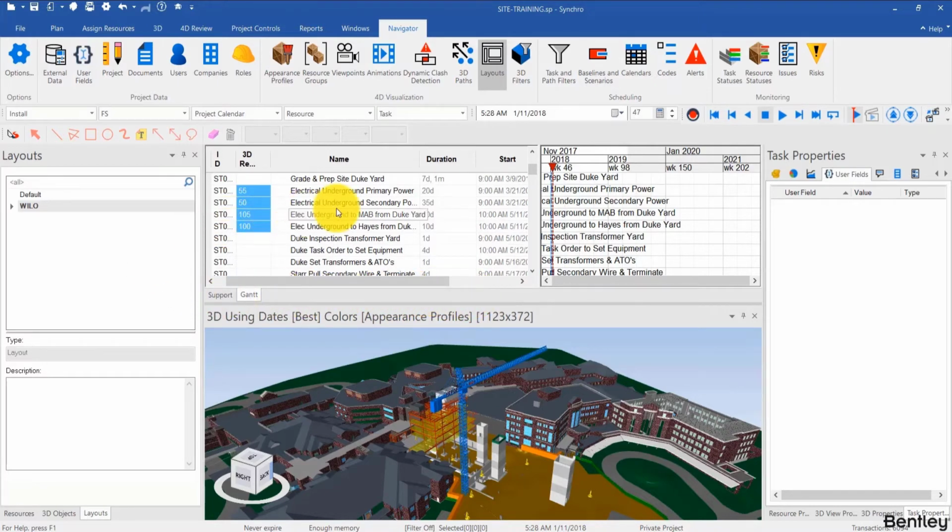And depending on where you are over the course of your plan, whether you're assigning costs, building sequence, or adding durations, you change accordingly and save it as a layout. But it can also be used a lot when you're conducting meetings. For example, let's say you have a meeting once a week with the steel crew to review the sequence, then you want a layout by scope. So for example, you use filters for that.